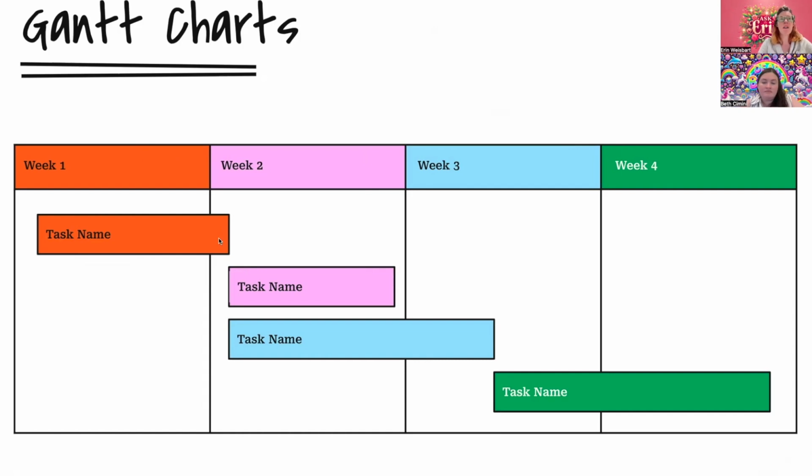but having some idea going along in a time frame of what is the task that needs to be done and over what chunk of time it will be done. The act of putting this together can make clear, oh, if they want us to get done with our work by the end of week 4, they really need to get us the data in week 1 because this is how long the components take. And it can also make clear things like, oh, yeah, pink task and blue task actually can be done at the same time.